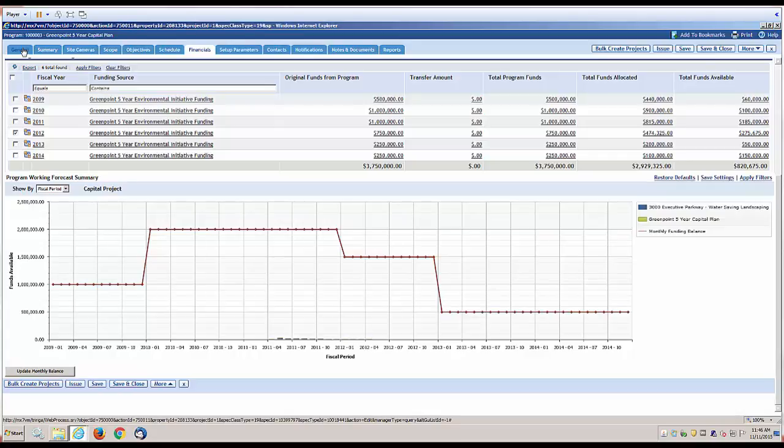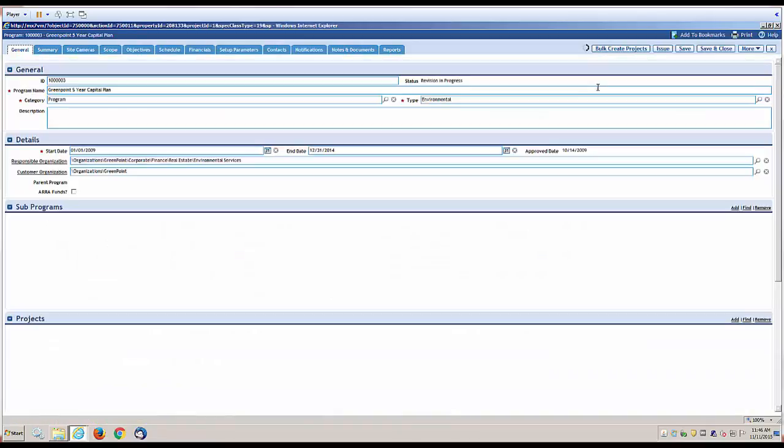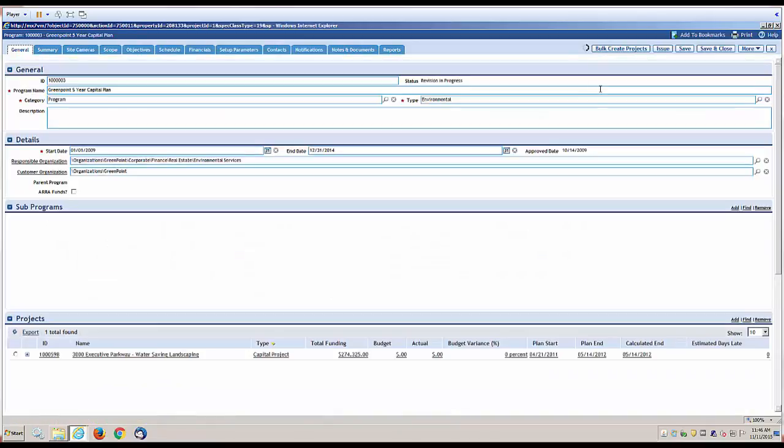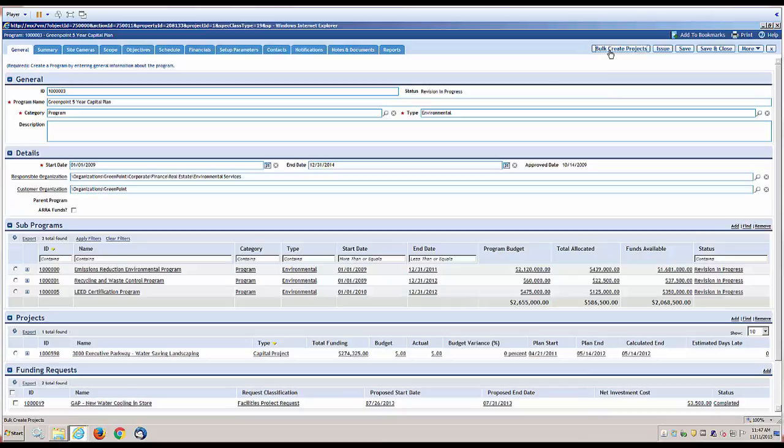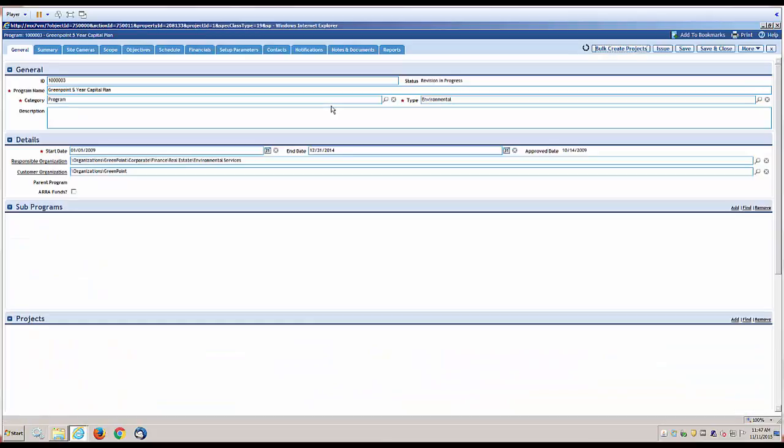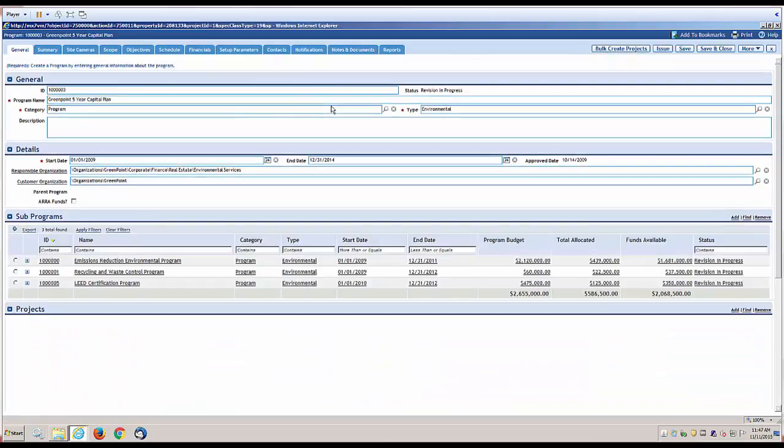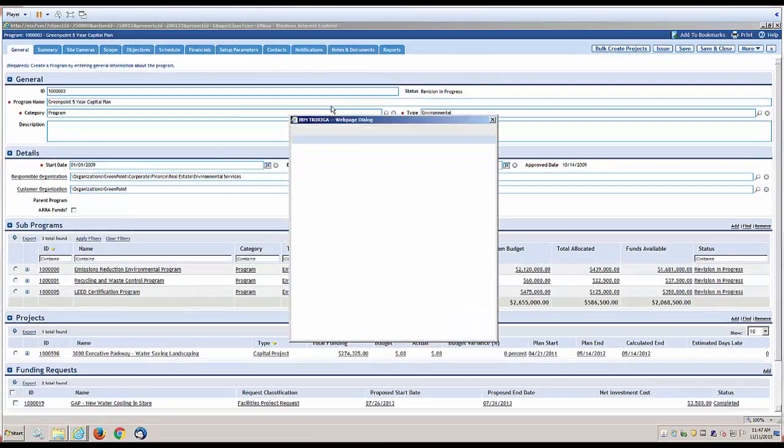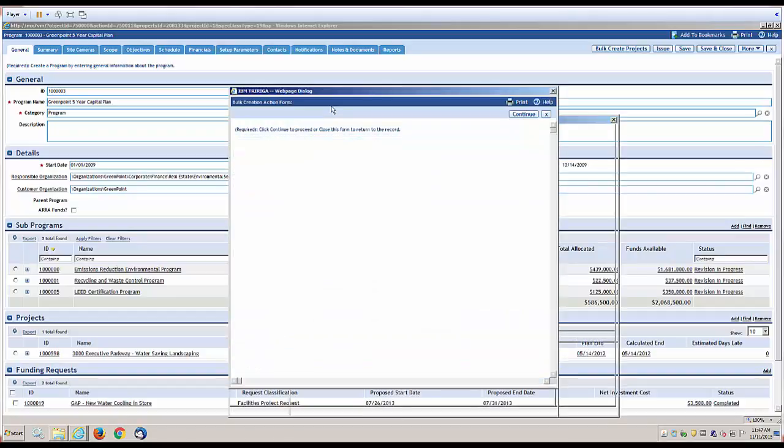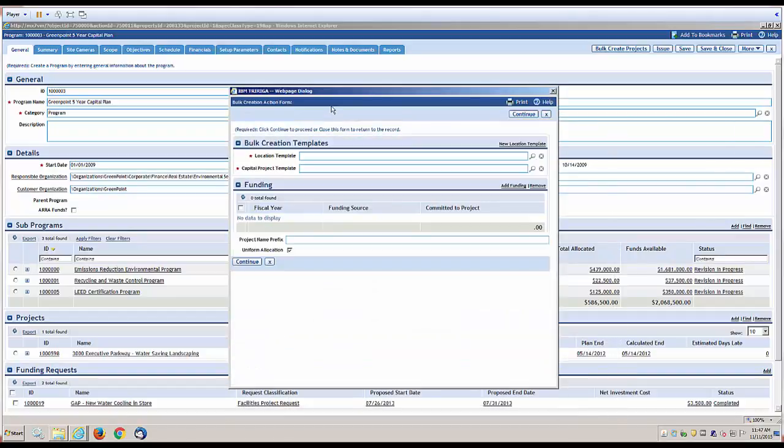One final and very important and powerful piece of functionality is the ability to bulk create projects. For instance, I may have a list of locations. That list of locations may include, maybe it's my stores in Texas.